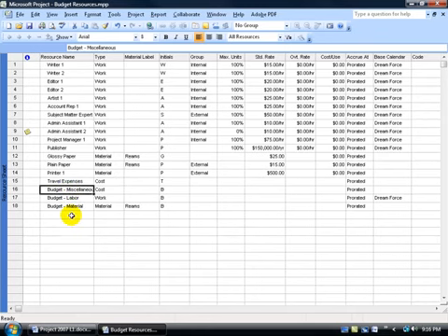In other words, how much we are setting aside for the cost, or that we're budgeting for, the work and the material resources. Now each one of these is going to be different in how it tracks. For example, this is going to be in currency, this is going to be in hours, and this is going to be in units. Let's go back up again to currency.